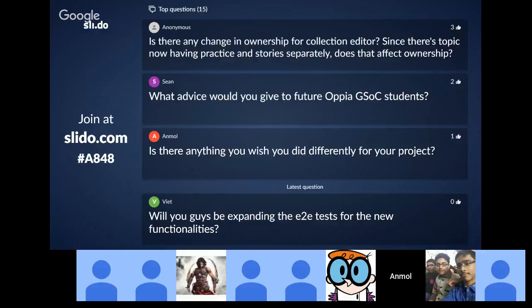And one more important thing I would say is about milestones. I thought I could make better parallel PRs. I had a lot of stuff in my milestones which I was supposed to do in parallel, but I did not again plan out the helper functions, and some of them started getting overlapped and needed to be used, and I had to introduce a whole bunch of to-dos and then follow-up PRs one after the other. So the parallel PRs didn't go as smoothly as I thought they would. So that's something I would have liked to do better. That's it. All right, thanks, Pranav.